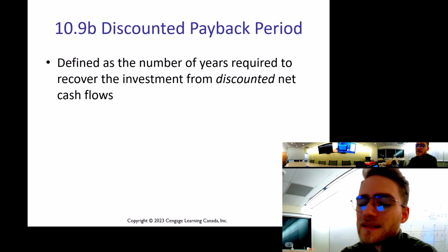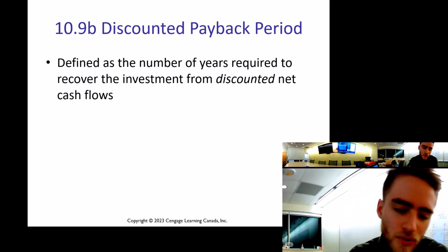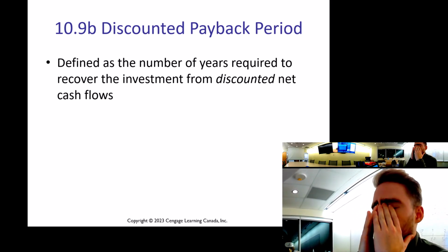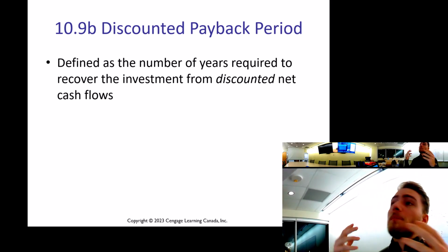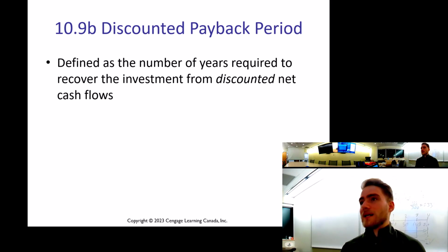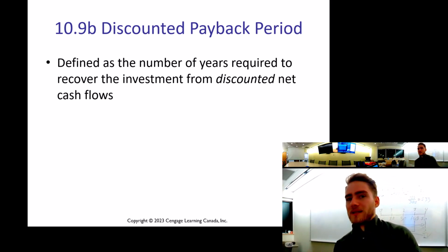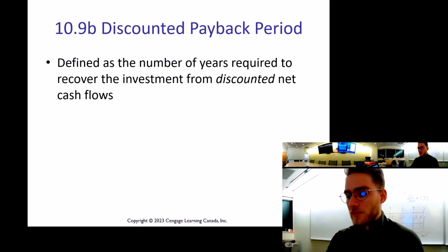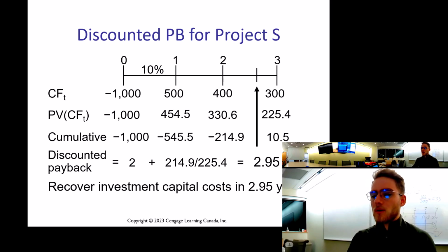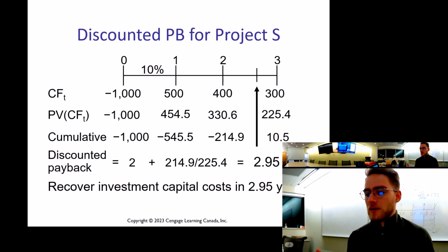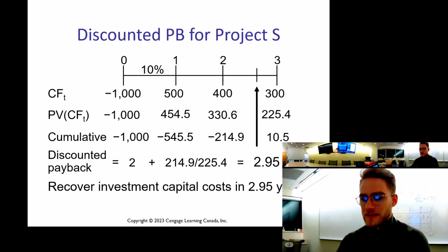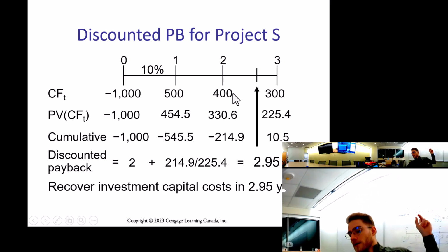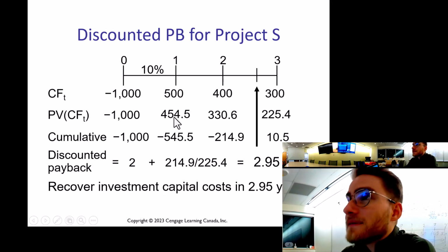And it doesn't fix the fact that we don't know what happens after you get your money back, right? It doesn't necessarily tell you if it increases your wealth, but we factor in the time value of money to come up with our revised estimate of how long it takes to earn back our investment on a project, right? So this is the exact same scenario, but as if we factored in the time value of money. So instead of using these dollar amounts like I did over here, I'm present valuing them.